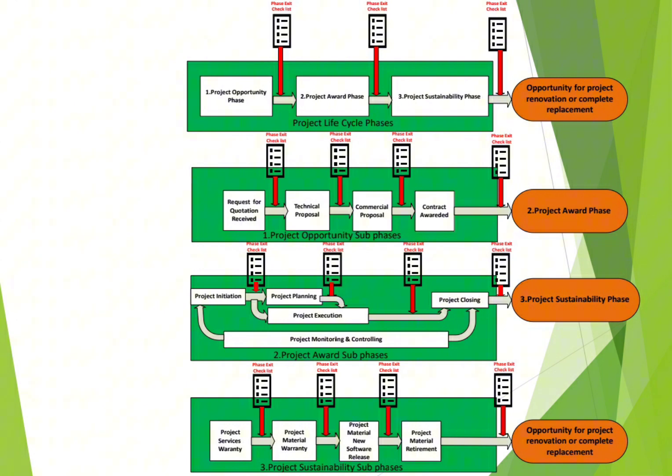In this phase exit checklist, sure, you need to have the minutes of meeting, the internal agreed minutes of meeting, the external minutes of meeting with your customer, updated milestone dates for the project, and sure, any formats for the bank guarantee, as we discussed. If you receive it from your customer, all of this needs to be there during the phase exit, so that you can start the execution of your project.